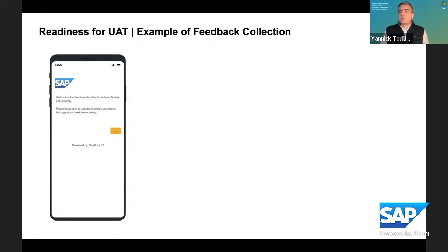Something also to be considered is that this is not something you can deploy for a project of 3 months. Otherwise, you will have that feeling of being surveyed every week. So we really have to think about projects that run at least 6 months, with an audience of maybe 100 project participants, or maybe 50. That could also be an option.